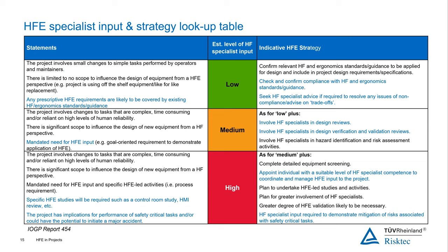As you go down that table, you'll see a higher level of input. So if you get to the row at the bottom and we look on the left, we see that if you have specific HFE studies that you need to do, or if you have implications for performance of safety critical tasks, where you've got the potential for a major accident, a major process safety accident if you don't get it right, then that's likely to be a project where you need a higher level of HFE involvement. So we've got a high level there.